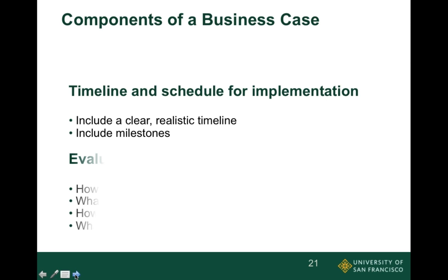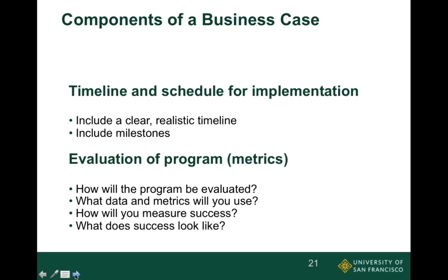And at each point, include a milestone. We'll have X amount of people trained. We'll have the walls up. We'll have the simulators in place. We'll have whatever, so that you can follow along on the timeline and then be able to celebrate these milestones that occur along the way. So a timeline is very important, and it needs to coincide with the budget cycle.